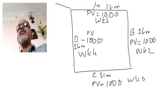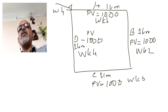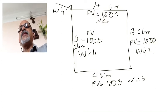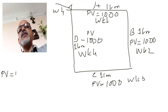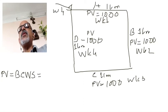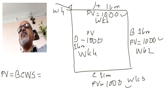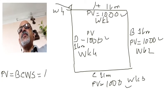I am doing a review of the project after week four. The total value of work I am supposed to complete as of the review date is the sum of the plan values, also known as Budgeted Cost of Work Scheduled (BCWS). Till the fourth week we have scheduled work worth $1,000 + $1,000 + $1,000 + $1,000, so BCWS till the review date is $4,000.